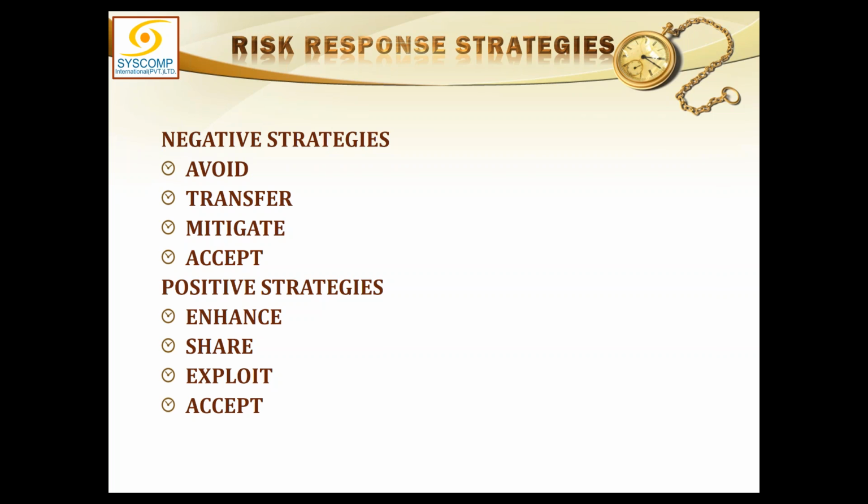But for positive risks, the situation is completely reversed. We don't need to avoid the risk, we need to enhance the risk. The positive risk, the opportunity, I want it to happen to me. I don't want to avoid it. I want to enhance it.